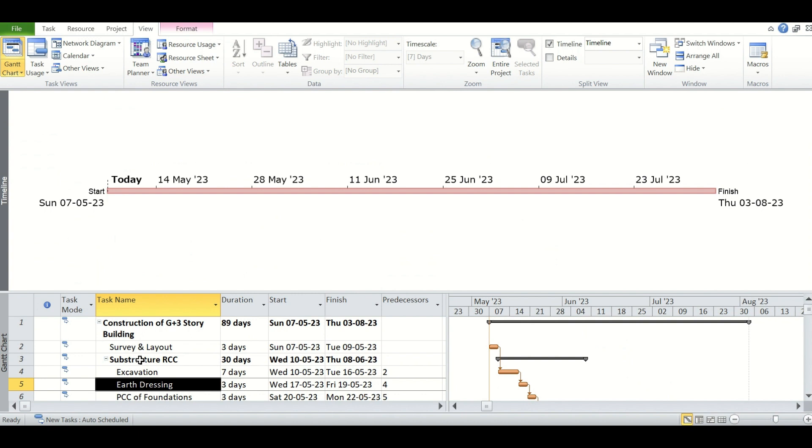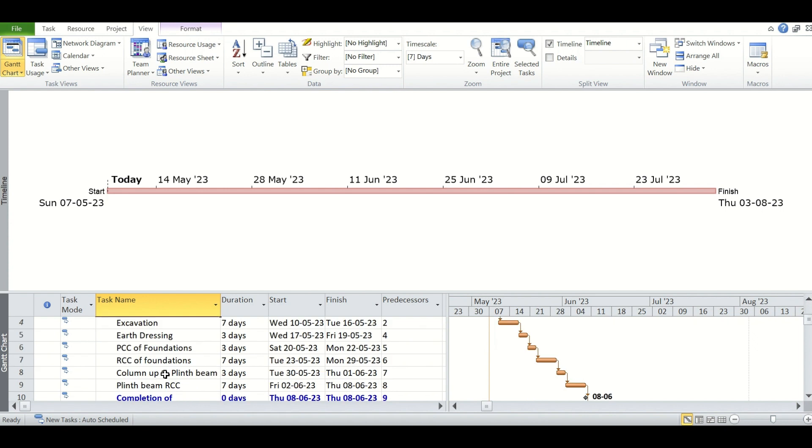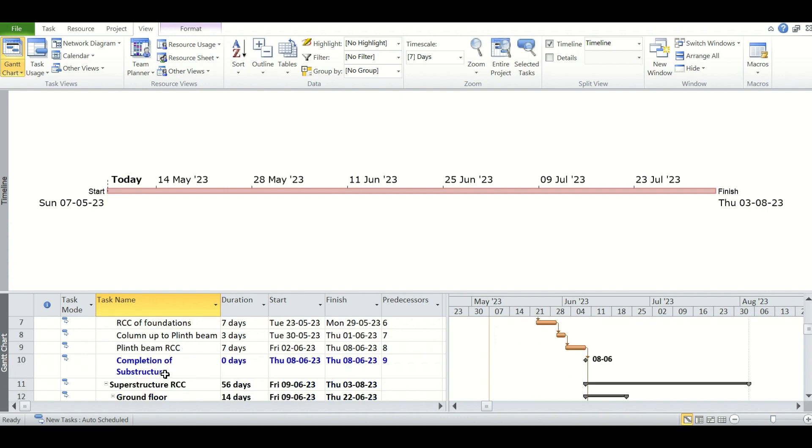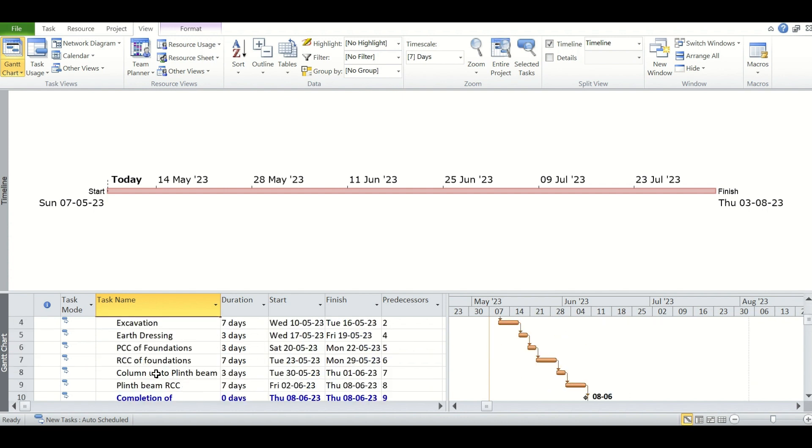Now as the first activity, we will add tasks to this timeline. Only important tasks should be attached to the timeline so that in any meeting you can talk about the major milestones or major tasks and show them to your audience instead of displaying the whole program which may be 500 or 1000 lines or even more. So we are now adding the RCC of foundation as the first task. This is a very major task, the RCC of foundation.